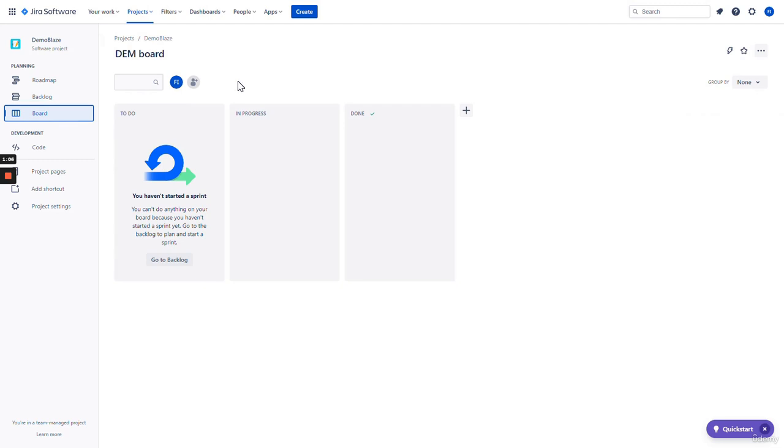In the Agile Scrum board, you have different statuses for each unit of work or each user story. For example, a user story in the to-do column would mean that it hasn't yet been started, but is planned to be executed. In progress currently means that it's being worked on, and the done column means that when the user story or the work is here, it's wrapped up or has been completed. You can customize this workflow and even add your own custom columns for your project needs.